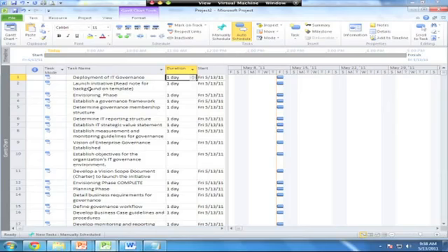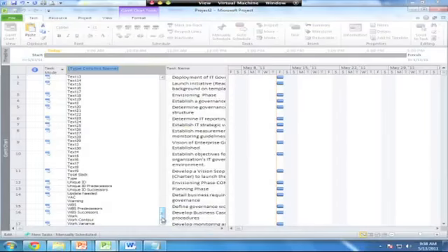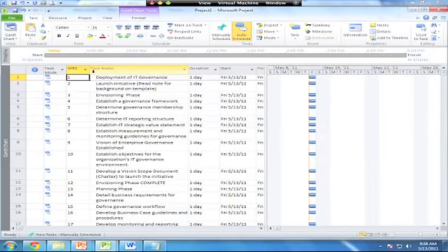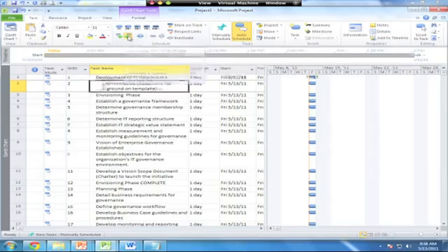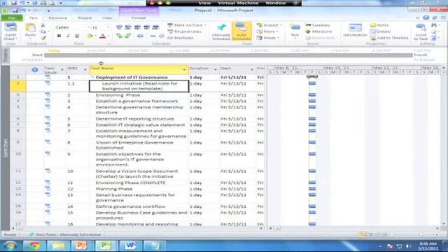First, we're going to work with the work breakdown structure idea, and let's add in a WBS column here. I'm going to insert a new column into my project file. So insert WBS, scroll all the way down here, I've got a WBS column. These are preset fields that are already built into Microsoft Project. The reason I add this in there is so that you can see that as I now work with the indent and outdent buttons, this basically treats it like an outline. If you're doing a written outline view of a WBS, this is how you'd indent these lines to show how they fit together.